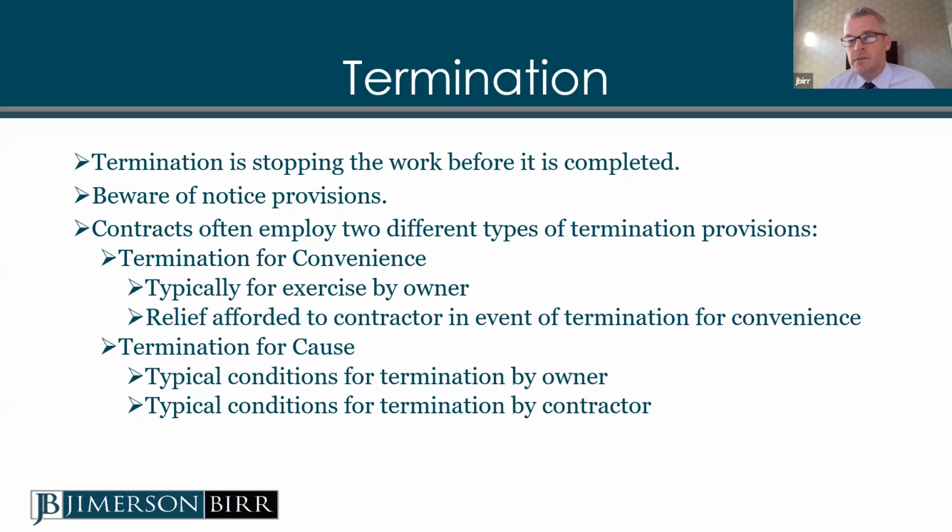There are certain situations where, depending on how you're getting paid for your work, you'd want to get paid, of course, for all the work that you've done up to that point. But you want to add in your contract that you get your profit on the work that you haven't performed. That seems fair. I can tell you I've negotiated both sides of that, and if you're the party being terminated for convenience, you've prepared, you've budgeted for that project and the profit that you were going to earn. So it's fair game to ask for profit on work not performed. If I'm the party terminating, I'd say, no, I'm going to pay you for what you've done to date. I'm not paying you any more than that. I have that right. So pay attention to that.